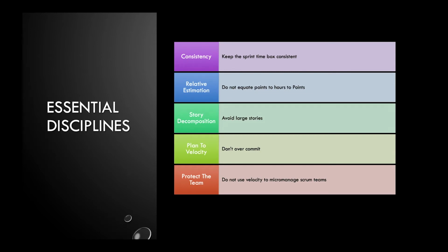Large stories also erode the usefulness of historical velocity because the likelihood of not completing the work in a single sprint increases, resulting in carryover of work from sprint to sprint. If a team commits to more work than it can complete in a sprint, the impact is an erosion of focus. If a sprint backlog is too large, prioritization and interdependencies increase, resulting in less efficiency. In the end, overcommitment usually results in more stories in progress and fewer stories completed.